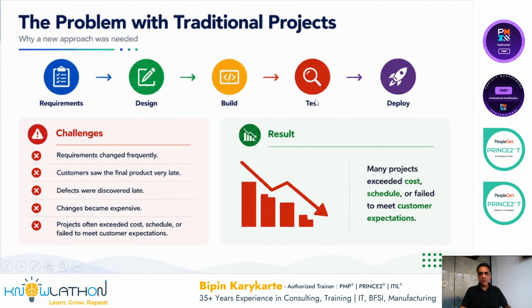Because the project has already moved to a very advanced stage, going back and making changes was very expensive. You will lose a lot of time, and whatever you have already done may have to be undone, redone, and then done again. So these were very costly implications of the old model, right? Because of all of these reasons, projects often exceeded cost and schedule, or failed to meet customer expectations.